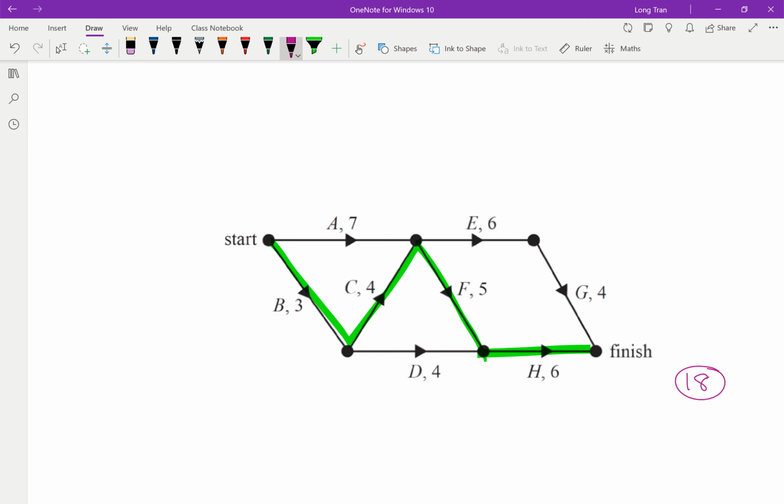What I'm doing now, okay, is I then reduce this by 1, so 6, reduce this by 1 becomes 3, and then reduce this by 1 becomes 4, right? What you see is as I went through, I reduced this by 1 because 3 plus 3 gave me 6. If I didn't do that, this would have been 7, and this is still the critical pathway anyway. So as I reduced A, I had to also reduce C. Okay, so now you can see that they both end up at 6. 6 there, that means that this now becomes a critical path because that also gives you 6.